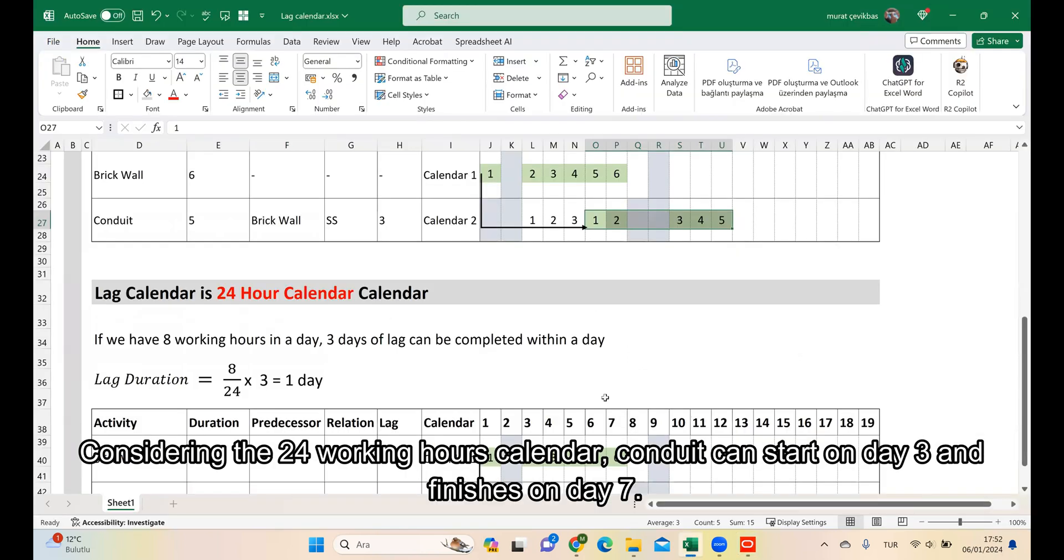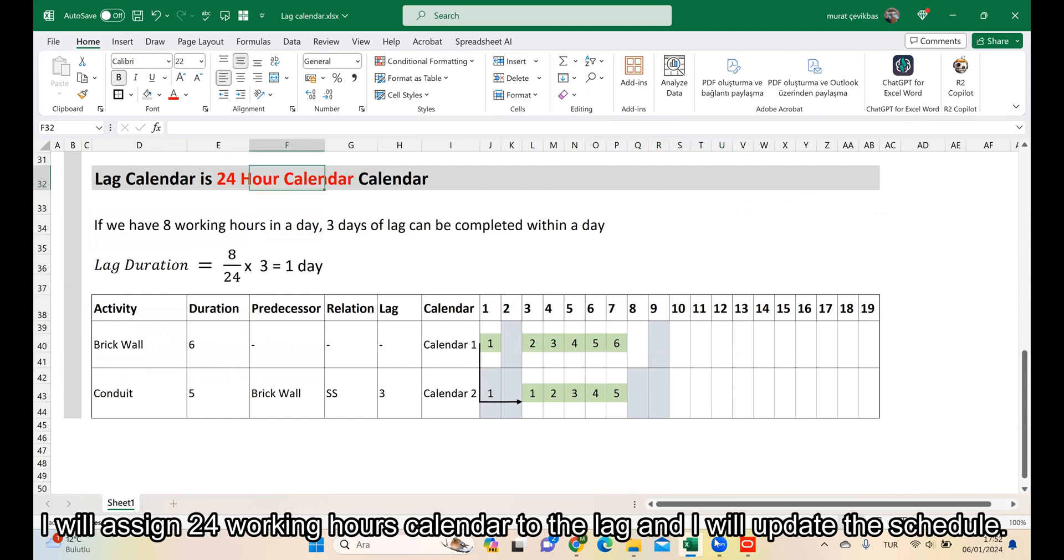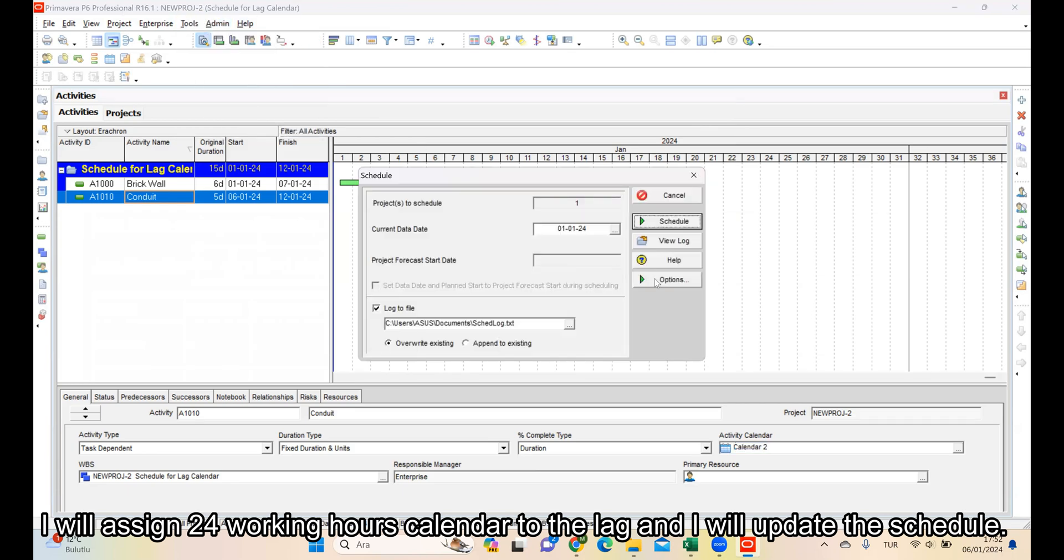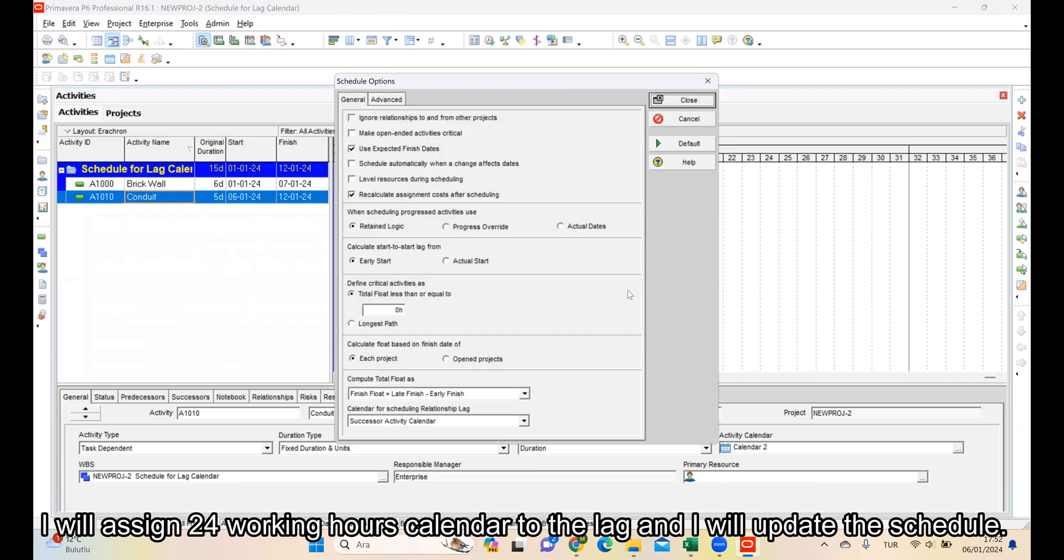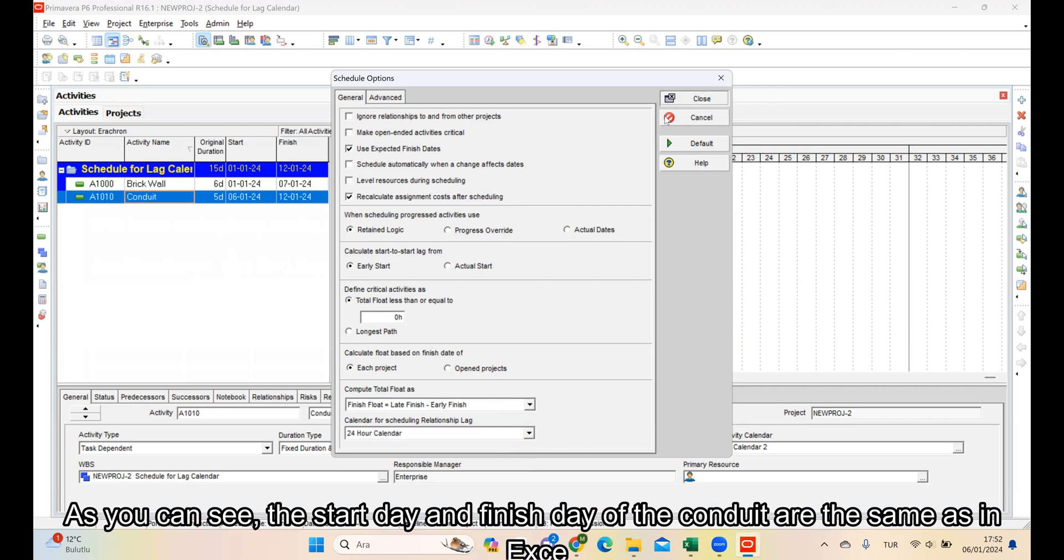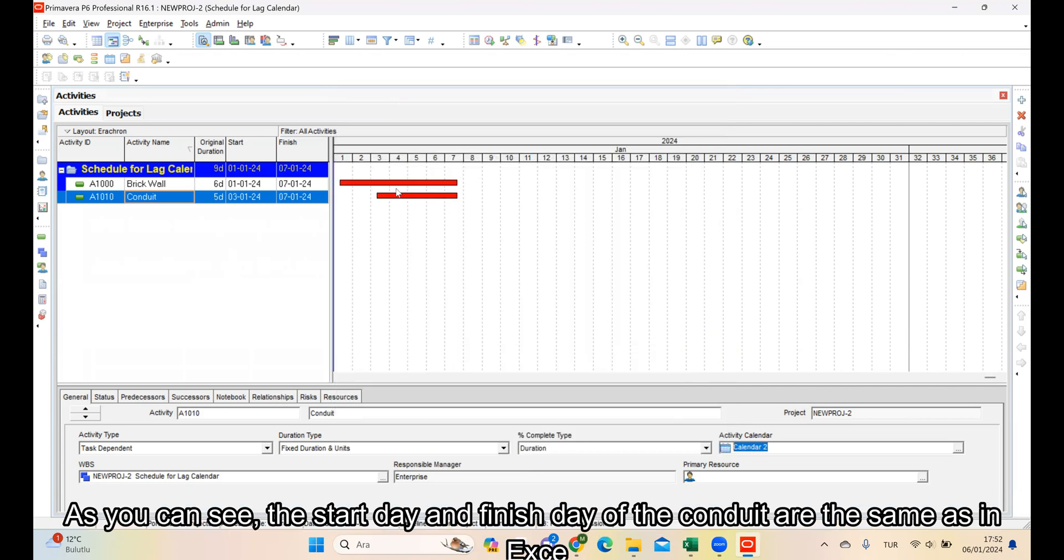Considering the 24 working hours calendar, Conduit can start on day 3 and finishes on day 7. I will assign 24 working hours calendar to the lag and I will update the schedule. I will close them. As you can see, the start date and finish day of the Conduit are the same as in Excel.